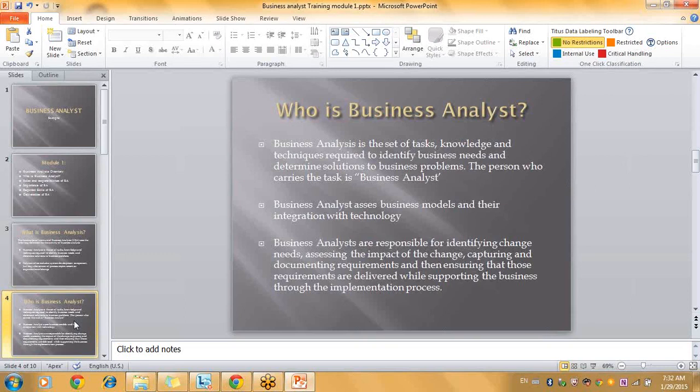What is the impact? Is it something that can be done easily? Is it a simple change, or is it going to be a code change, right? There are some things that they can do easily by changing the length of the field in the database, or you need to rewrite the code. If you have to rewrite the code, we need to make sure a whole round of testing is done in order to ensure my existing functionality works, right? If it is not a simple change, what is the impact? Is there any impact on the other components if you are changing it here, right?